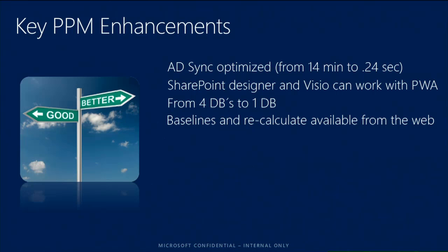And baselines, obviously, you can now set baselines the same way as you do in the client. You can do that from the project web app web part as well. The really important issue here is that the calculation engine in the project web app is now the same calculation engine that's in the client. But it doesn't mean you'll have exactly the same results, because there are still some fields that you don't have access to in the web app that you do have access to in the rich client. Yes, which may affect the outcome of projects. Exactly.